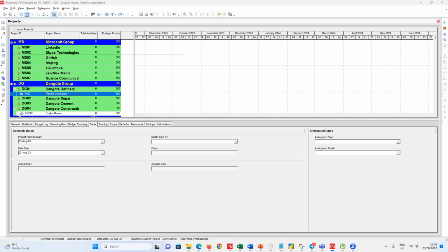You can reuse labor, you can reuse non-labor, you can reuse a machine, you can reuse Daniel for another project. But if I bought paint in B&Q and use that paint, I cannot claw back the paint and use it. These are consumables. And money is part of consumables as well, right?